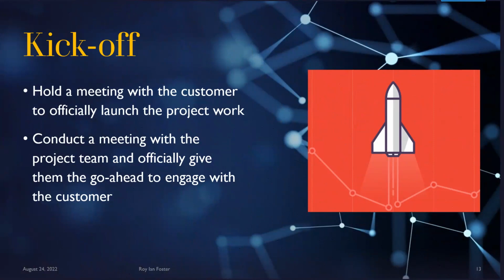That'll very often be done with meetings. So, that might be in person. More likely today, it's going to be virtual. Either way, this could look like a meeting with your customer where you officially launch the project work. And then you can set expectations with the customer. You might go through a slide deck and you might set some expectations about different team members that are going to reach out to them to perform work. And so they're not surprised. And it kind of gives them a sense of everything you've pulled together. They've been heard, they've been listened to, we know what's going on, give them a sense of confidence, get them engaged. After you do that is a good time to meet with your project team.